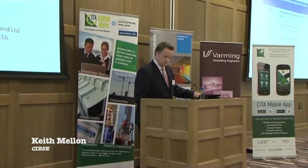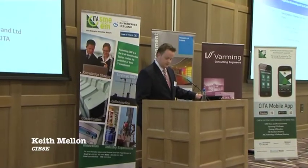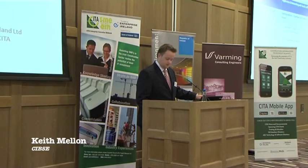It is important that consultants clarify the need for this with their client at the outset, as going to this level of detail is more time intensive than conventional modelling and would result in project milestones being missed if hours required are not estimated.